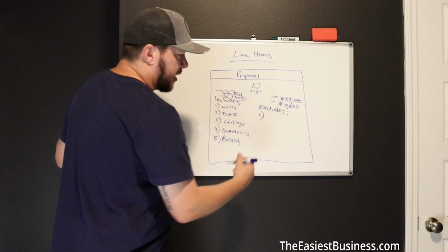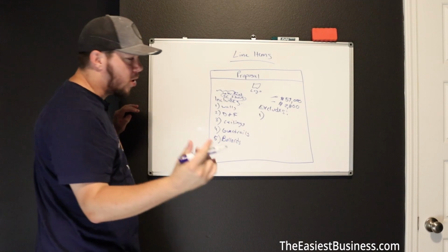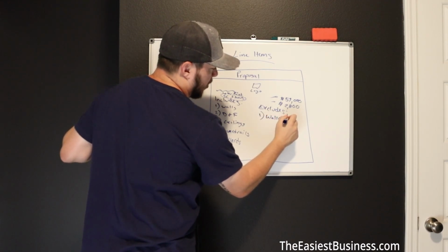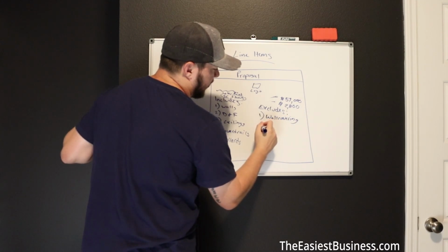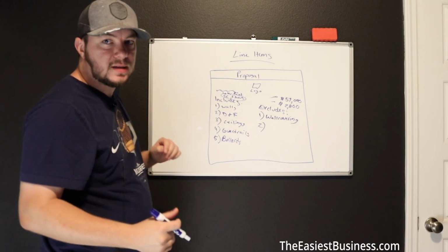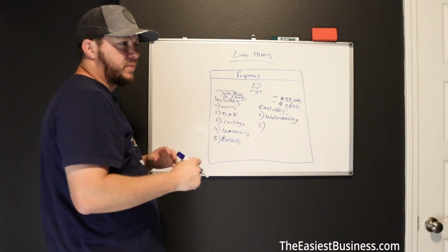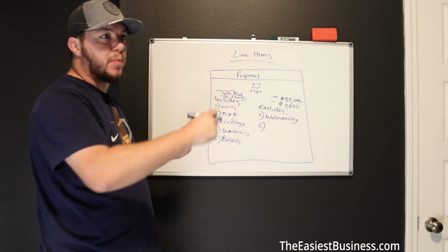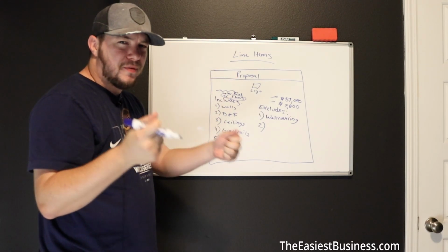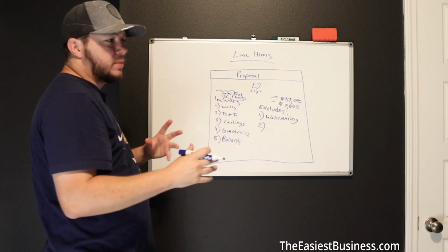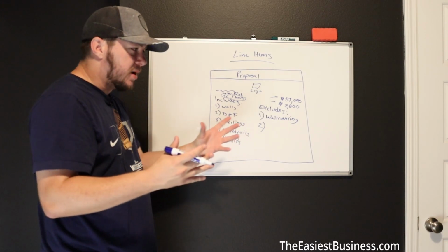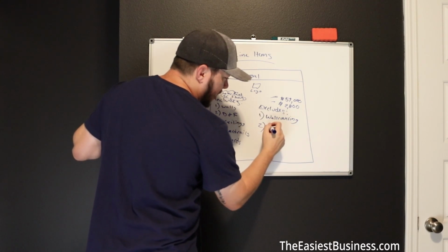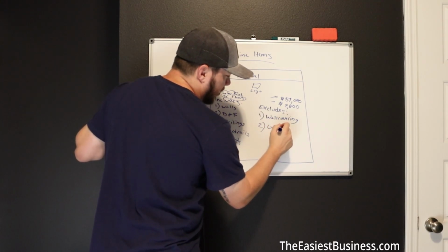So something like this might include, if you don't hang wallpaper, you might say excludes wall covering. This could be like if you do a Starbucks, a lot of times they'll have murals in restaurants, not just Starbucks, like Dunkin', anything. They'll have murals and stuff that are like wallpaper fabric murals. Or like a graphics package in a Starbucks, you could say excludes wall covering / graphics, or just put it on a new line item, excludes graphics package.